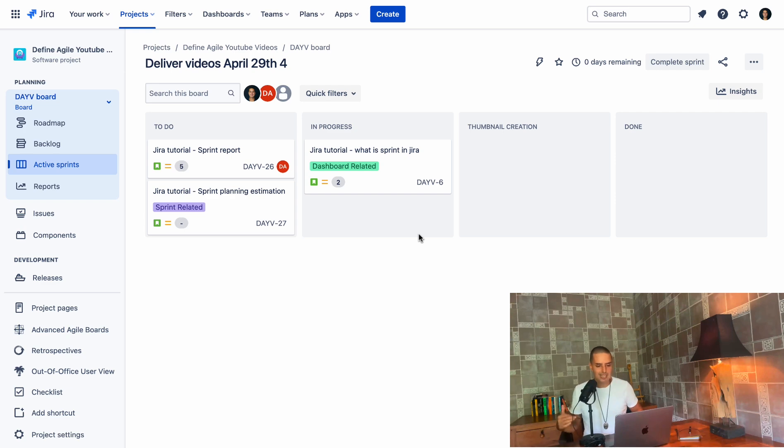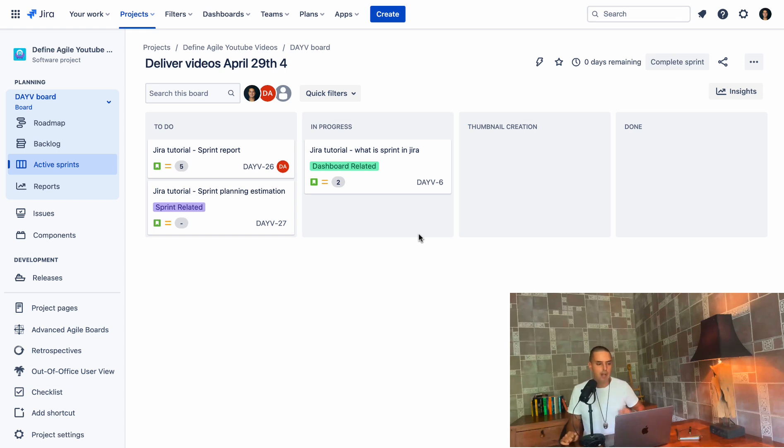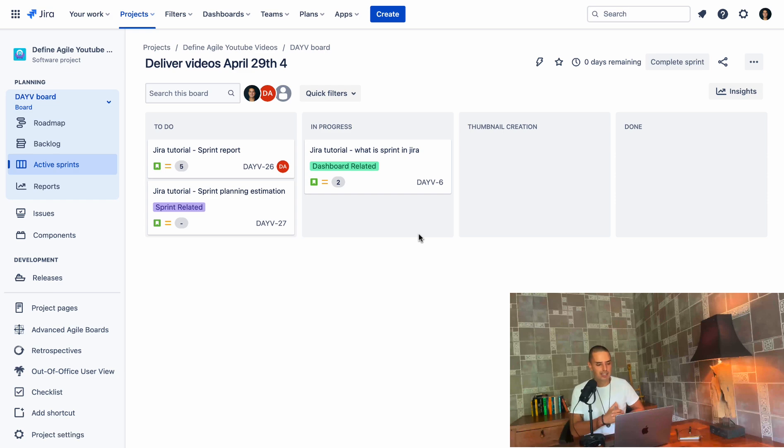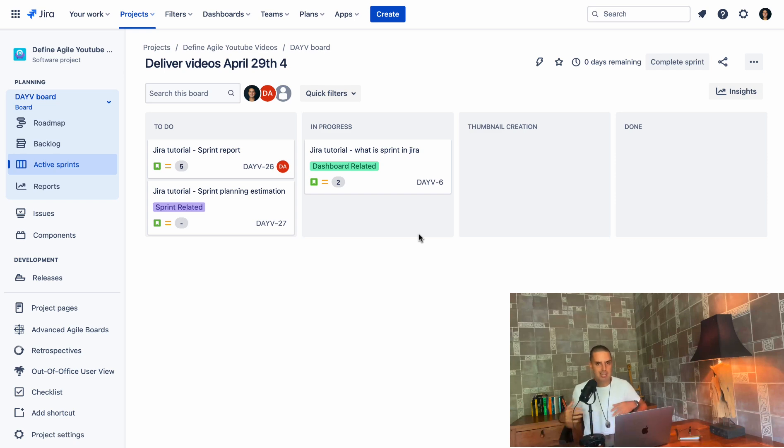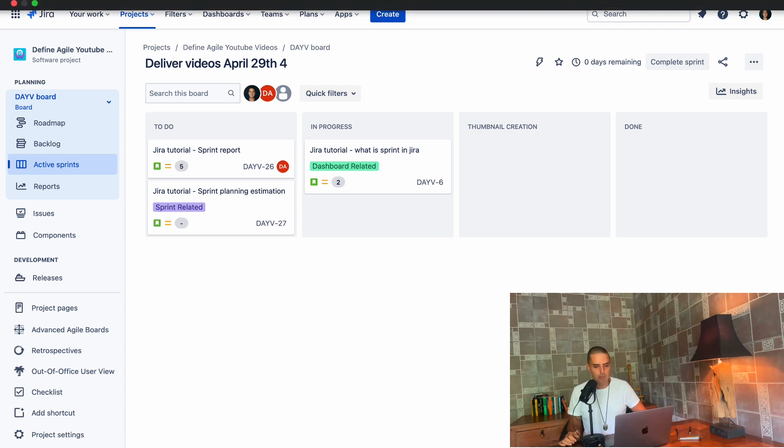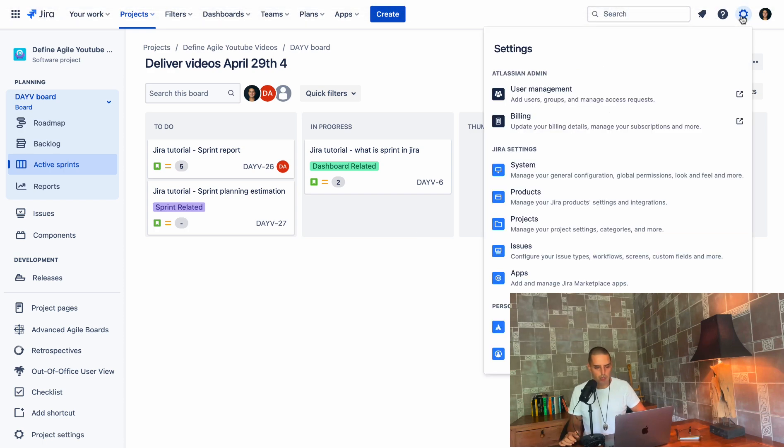Once you have a premium plan enabled, we need to do few things. We have a Jira issue hierarchy we need to set up and we need to create a custom issue type for the container. So I will call my initiative because initiative is something that is common language in Jira, especially in advanced roadmaps. So let's create a custom issue type. For that, we need to go to the wheel settings.